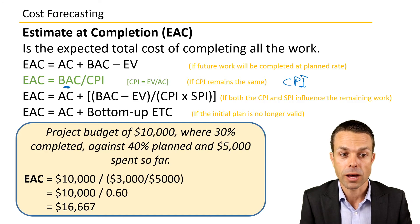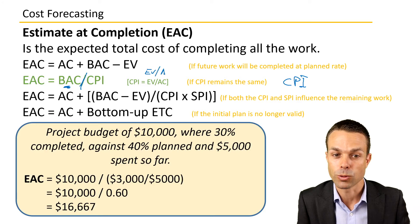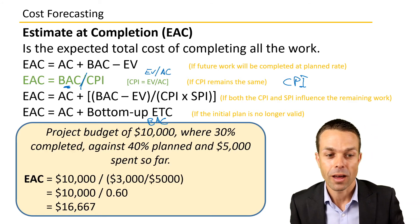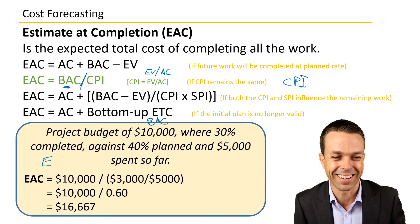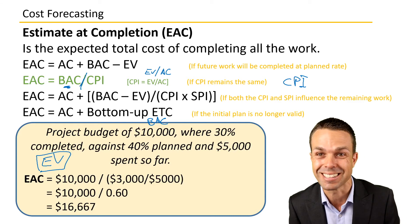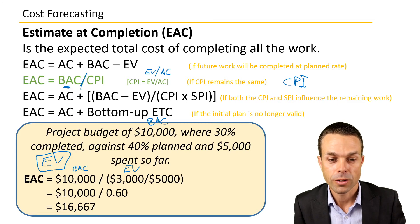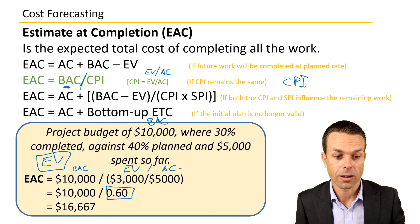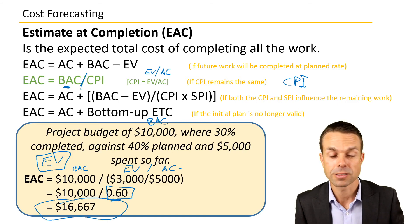The second EAC formula is BAC divided by CPI, where CPI equals earned value divided by actual cost. Our budget at completion is $10,000 and our earned value is $3,000. So CPI = EV / AC = $3,000 / $5,000 = 0.6. Then EAC = $10,000 / 0.6 = $16,667.